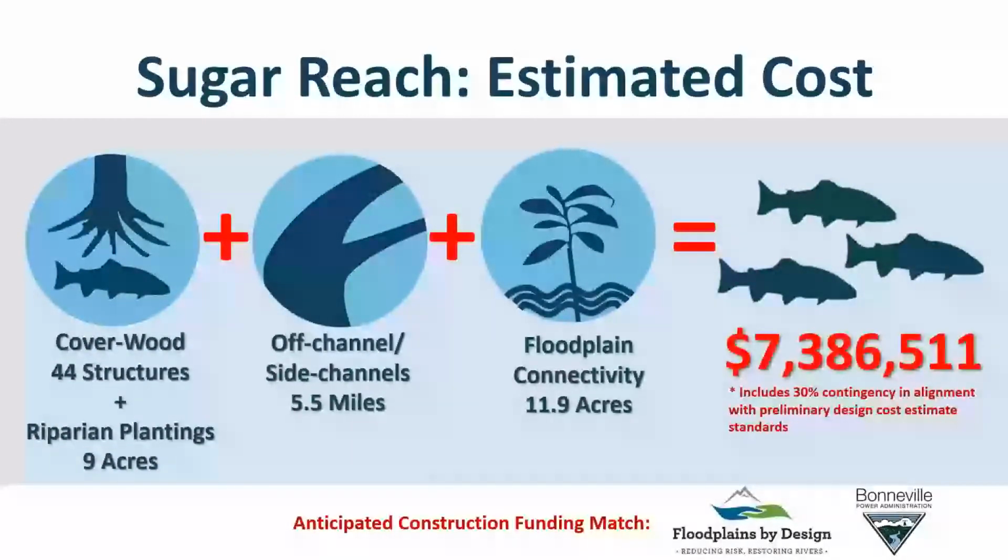Our expectation is those project areas would be constructed in a coordinated way, but with different contractors. We have found that if there are good ways to break a really large project up, that opens up the pool so that we can utilize local guys. And we really like to see the money come back into our community.